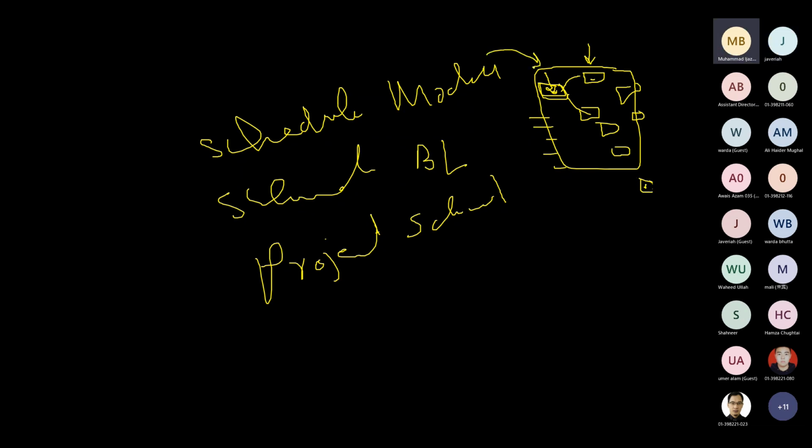So now let's say we prepare a draft of it, the first version of it. And then there are so many risks, management doesn't agree to this, stakeholders don't agree to this. Some resources are not available at a particular time. And then we readjust these things, right? We'll get various versions of the schedule model, and towards the end we'll reach a place or time where everyone would be saying that okay, this is the final state that we all agree to, and that model would be approved, and that approved version is called the schedule baseline. Is it clear? Yes, sir.